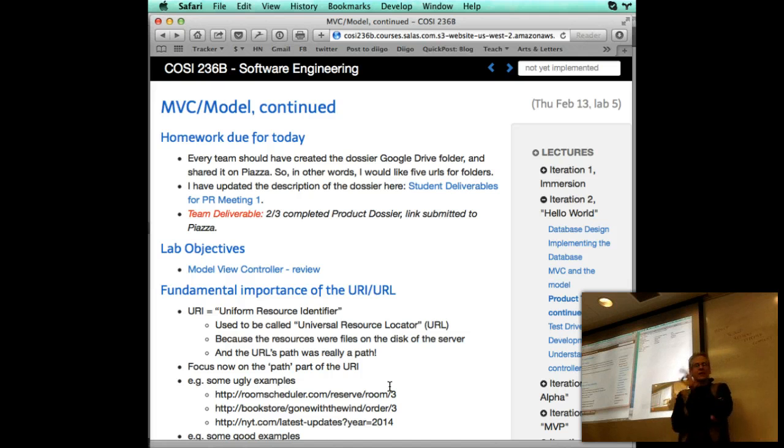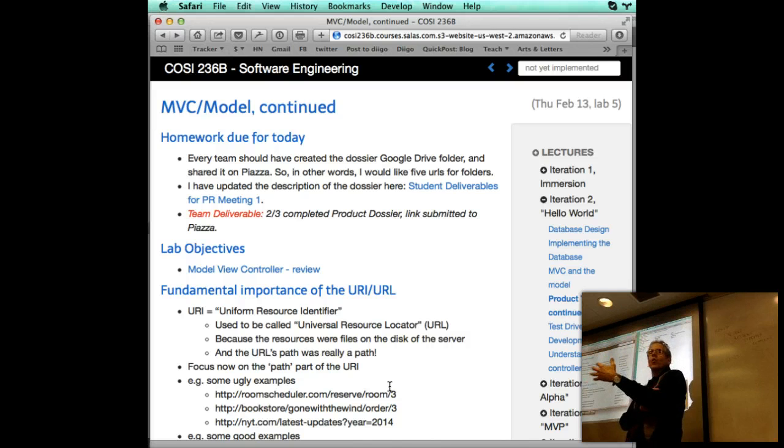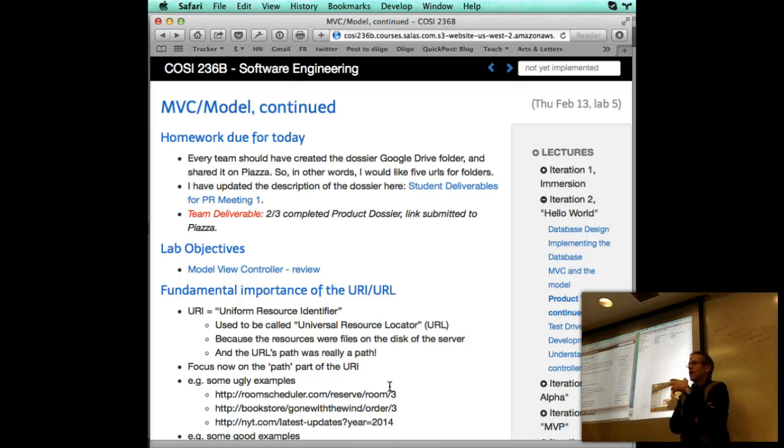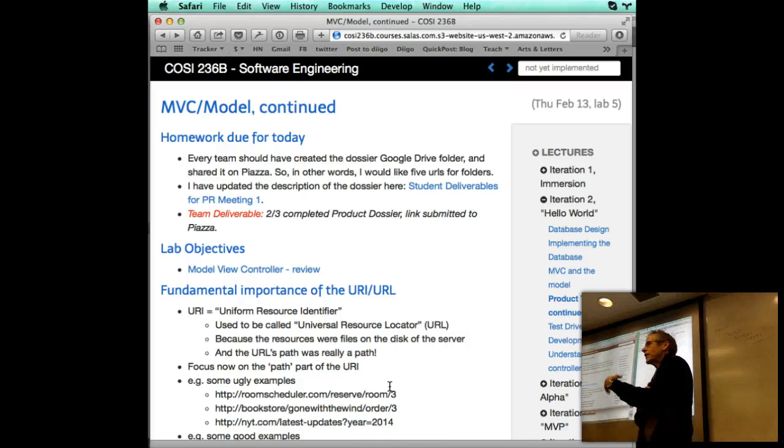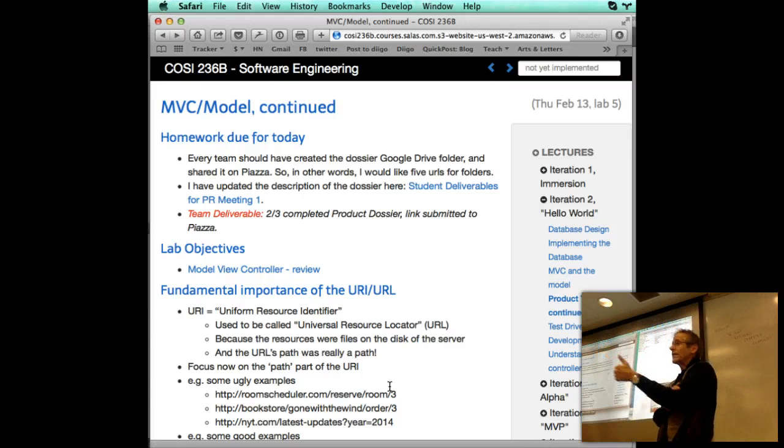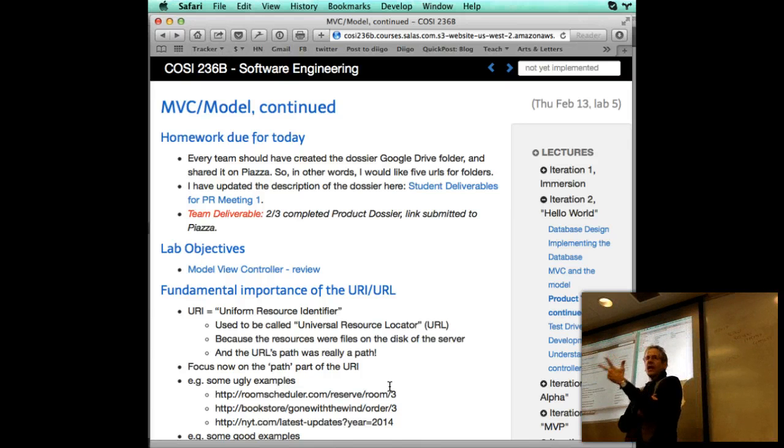And that's it. No, there's actually three pieces to it, but that's the concept exactly. The concept of Agile is rapid and iterative work with quick response to problems. And so the notion of a stand-up meeting is you stand up, the whole group stands up, you go around to each member of the group, and each one says three things. What I completed yesterday, what I'm expecting to complete today, and any obstacles that are getting in my way.